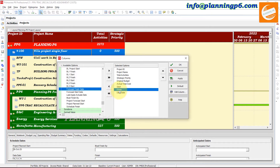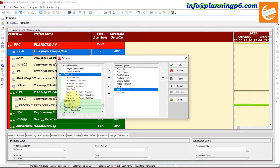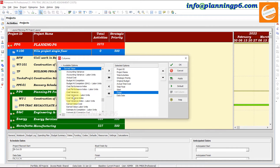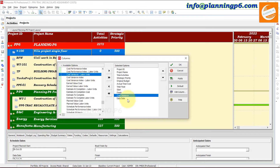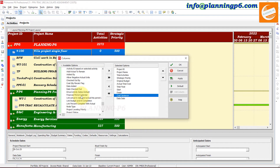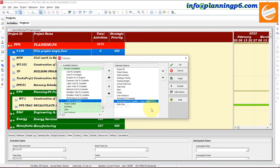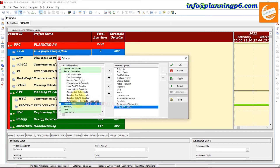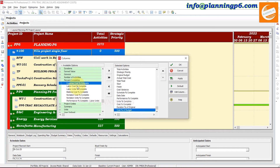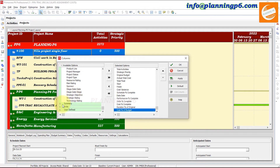From here we will add Cost Variance. If you want durations, you can add the Total Duration, and Total Float as well. Then from Earned Value, if you want to add Schedule Variance or Cost Variance, add them here. From the performance section, add Schedule Percent Complete, Performance Percent Complete, Units Percent Complete, and Cost Percent Complete. If you want Duration Percent of Original or Cost Percent of Original, you can add those too.